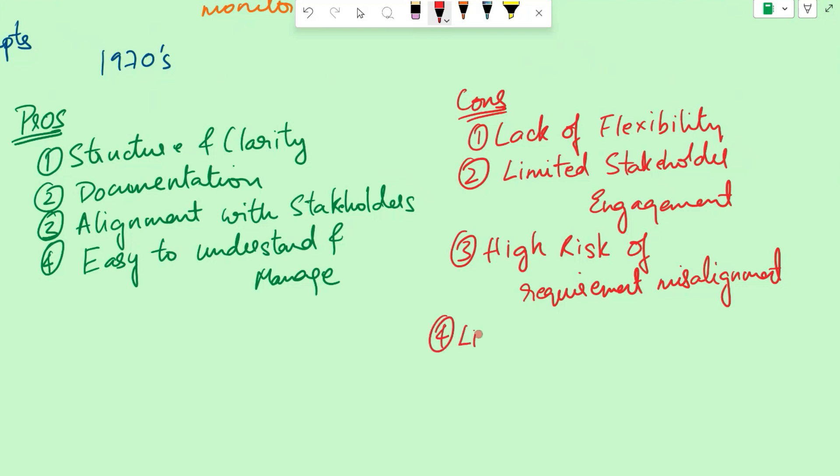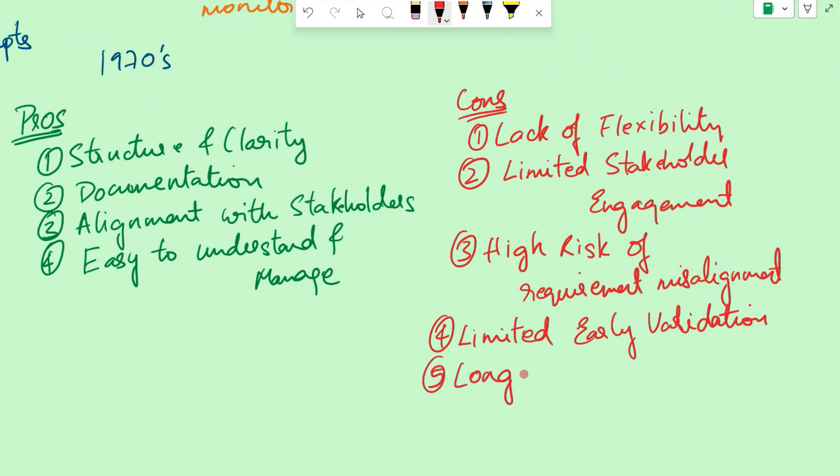Another disadvantage is limited early validation. The waterfall model does not prioritize early validation or feedback. Testing typically occurs towards the end of the development process, which may result in the identification of defects or issues at later stages when they are more expensive to fix. Then another con is long development cycle. The linear and sequential nature of the waterfall model can result in longer development cycles. Since each phase must be completed before moving on to the next, the overall project timeline may be extended.